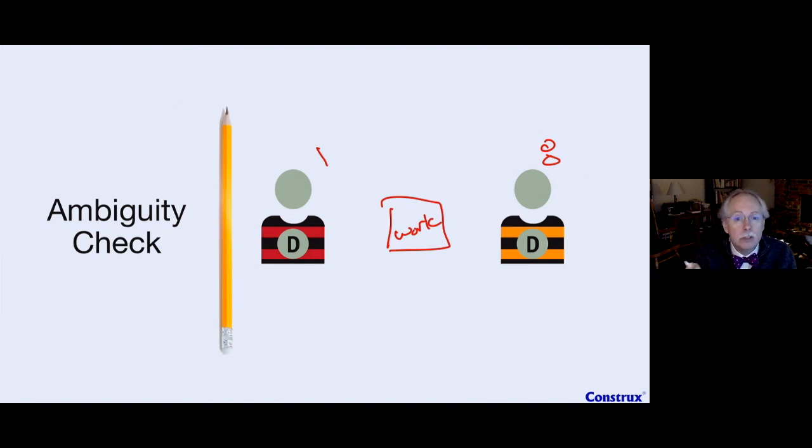And here's another bonus trick I want to give you. If you're this developer and you say, you know what, I've never seen anything like this before in my life, this piece of work, I have no clue how to build it. Yet we're supposed to act as a team to build it because we're running Scrum. Well, then I'm going to give it a 13 regardless. Because a 13 is basically saying, I don't know what this is. This looks really big and scary. We've got it sort of queued up for the sprint, but I think it's big and scary. Explain to me what it is, right? And that's going to, again, force the conversation so we all can learn and understand the work the same way, right?